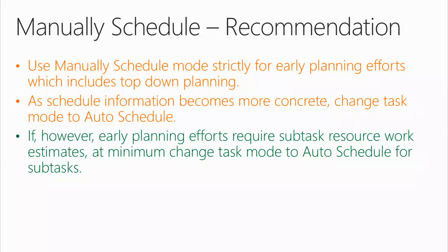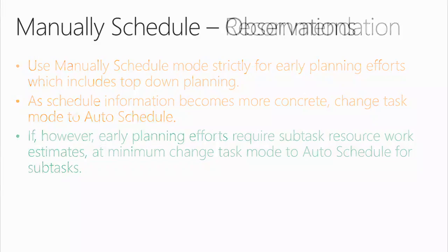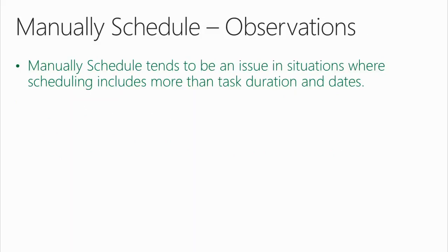Okay, so when you walk out of here today, our advice to you, my personal advice to you, is the minute you assign a resource to a task, get out of manually scheduled mode. Now, I have some observations for you to try and prove some of these points. And these are with customers.